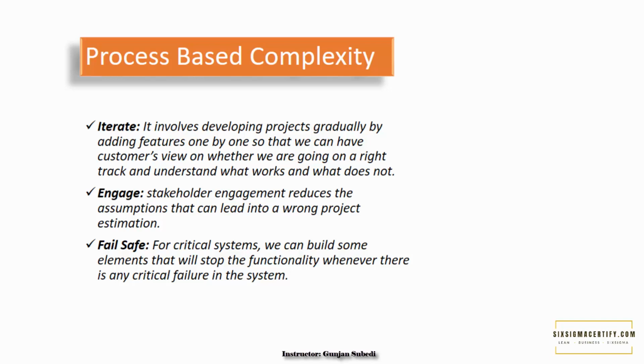Similarly, engagement. Stakeholder engagement is a big part of the stakeholder management domain in any project, and this is because good stakeholder engagement reduces the assumptions that can lead to wrong project estimation. Another is the fail-safe technique. For a critical system, we can build some elements that will stop the functionality whenever there is any critical failure in the system. So this also reduces the complexity.